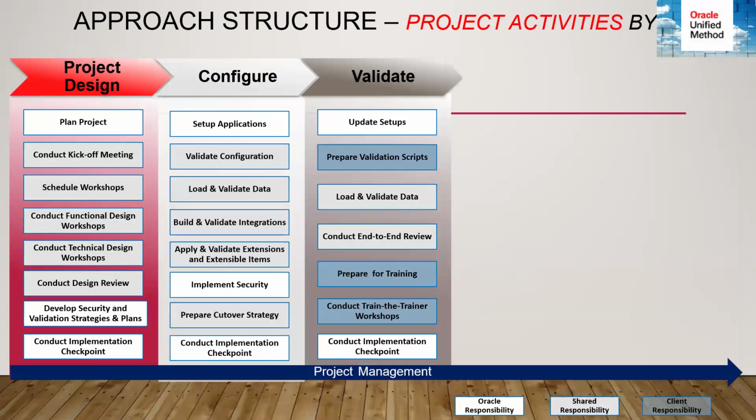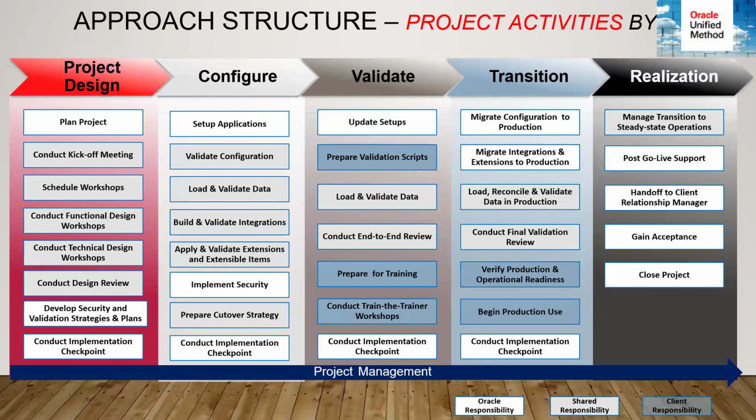So this talks in detail about what exactly happens during the project design. As I explained, we'll have a project kickoff meeting. We'll have scheduled workshops. Then we'll have design workshops on the functional side. And if there are any reports or any integrations happening, then we'll have technical design workshops as well. Then we'll conduct a design review.